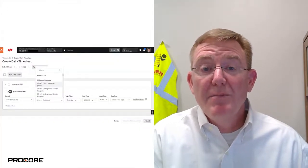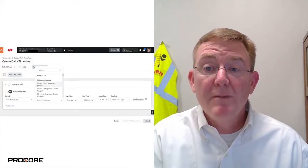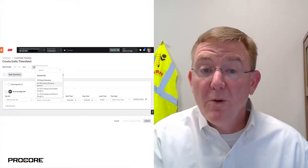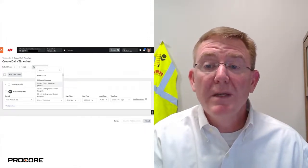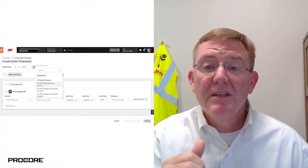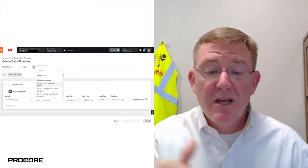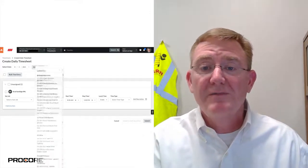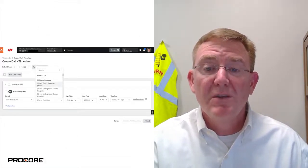But then we decided to implement the timesheets tool and use that more effectively to get our productivity passing into the budget to manage our labor cost. At that point, we realized there were too many cost codes, because once you implemented that along with sub jobs and started having the project team try to filter through, say you had 5 sub jobs and 100-plus cost codes on each job, you're talking about 500-plus cost codes, and you've got a field team trying to filter through that and pick which codes to use to put their time.